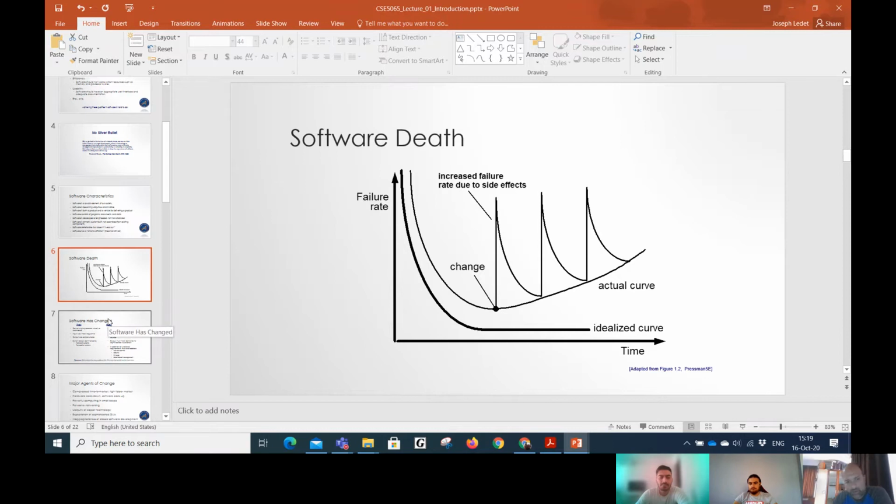For example, that company that I told you about, the first one I worked for as a tester, one of the allowed reasons for the customer not accepting the product was, I don't really feel good about it. We would say, what do you mean? Does it not adhere to the requirements? Oh no, it follows the requirements, but I don't feel right about it. Well, that's not really a reason for failure, now is it? But if your company allows the customer to have I don't feel right as being a reason for failure, guess what? That increases your failure rate. That's just automatically going to increase your failure rate.